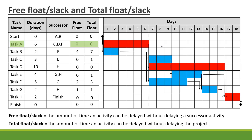Task A is one of our tasks on the critical path, so it doesn't have any free float or total float. Task B, on the other hand, has a free float of 4 days — it can be delayed by 4 days before it will have an impact on Task F. So the free float is 4 days.